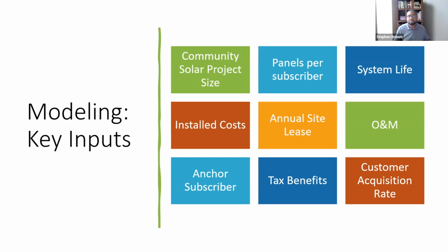What are some of the installed costs? What's the lease agreement that you have for the land itself? Again, operations and management, very important, and oftentimes isn't thought of at this stage. Really at this stage, folks will think about the construction part of the project and not the actual management of the project. And so there are times where the management and the construction aren't in sync, but you don't know that until later in the project development. And so, making sure that your O&M resources are in place as you're going through the pre-development stage of things,